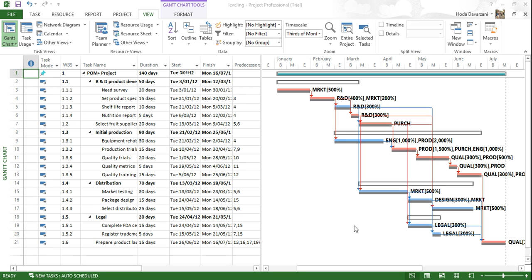When the project starts, it may deviate from the primary plan. For example, for one task, you may think that you need to have like 5 days to complete the task, but when you do that work, it will be finished in 4 days, or it might be even more than 5 days. So we need to update the project plan to see how we're progressing over time.